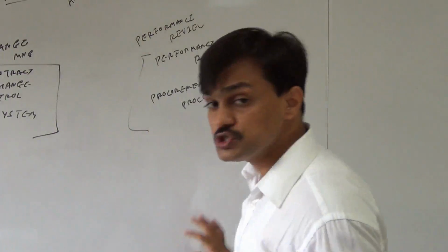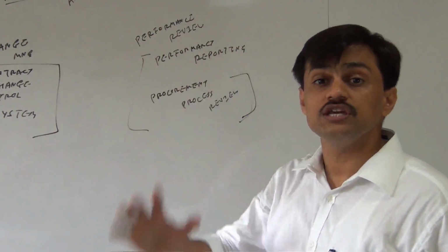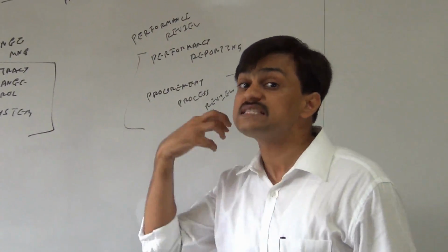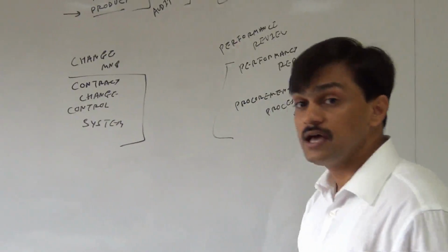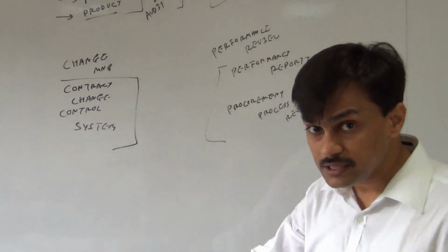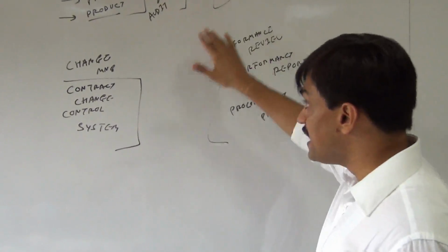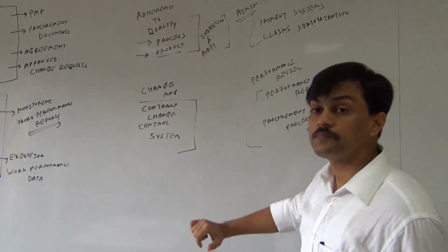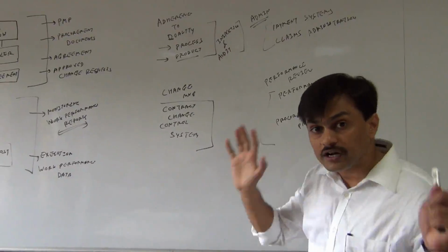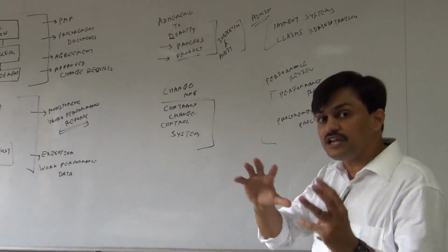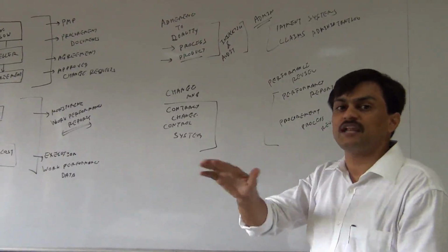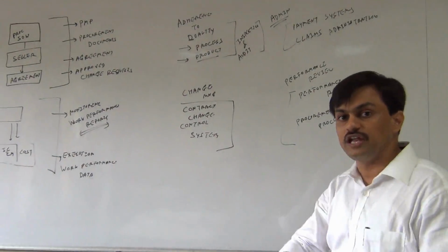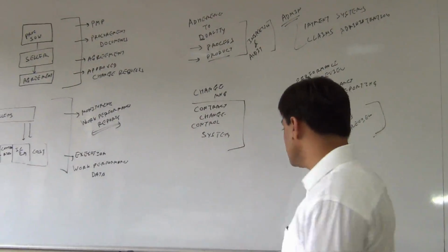On the top of these tools and techniques, we also need a record management system. Now since the procurement is a very legal thing, the claims, payments, the documents, the change documents, the quality audit reports, all these need to be recorded well, and so we need a system which is a part of project management information system, and we name it here record management system.